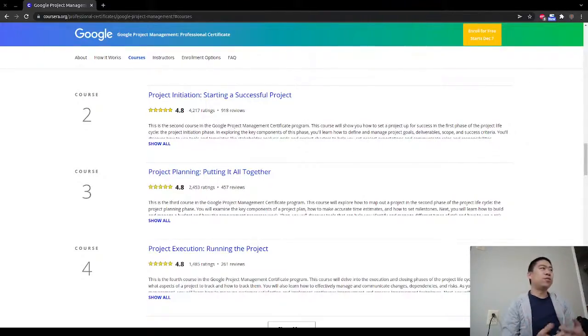Also for the estimation, we break down the work into milestones, and then further break down the milestones into multiple pieces of tasks, and figure out the dependencies, and then figure out who to assign, and get the timeline mapped out.